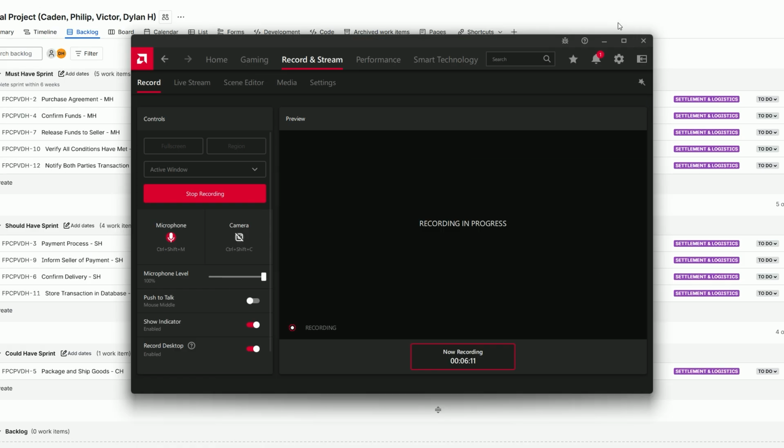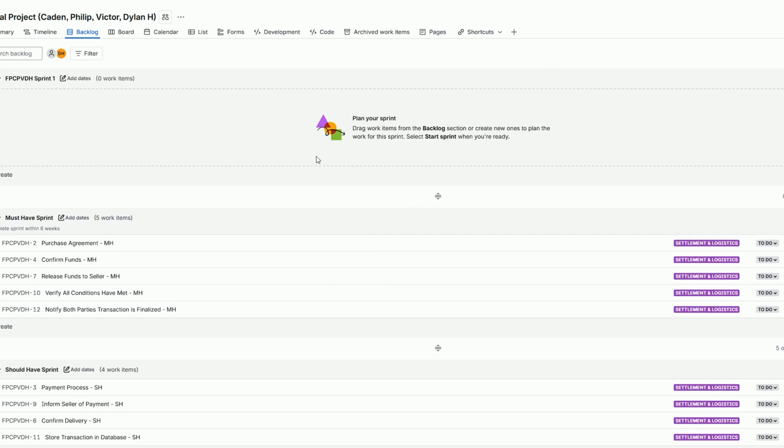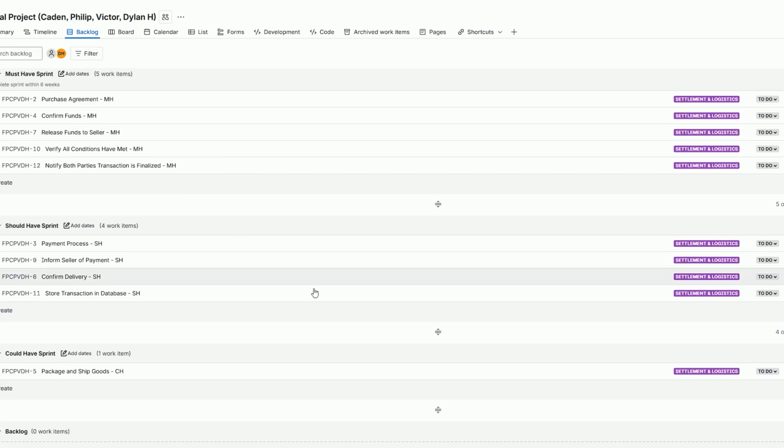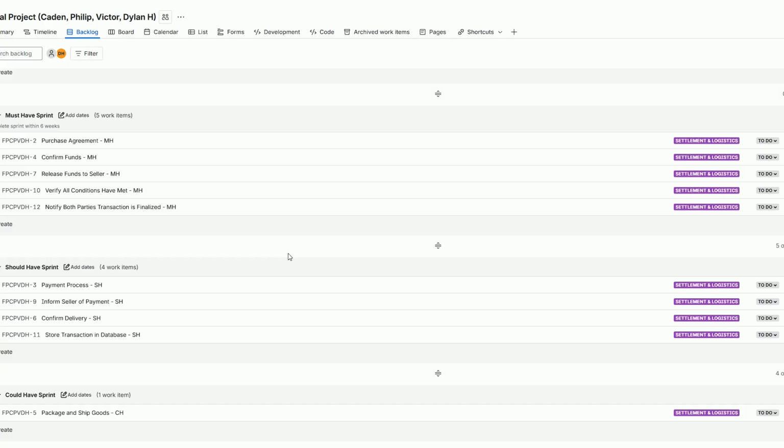Alright, moving on to the JIRA portion and our flight plan, understanding how we're going to break the work down. The way I decided to break the work down was we need to make sure we have our main priorities. These are the must-haves we have to have no matter what. So I've decided to break down our flight plans into must-have, should-have, and could-have. That way, if we're behind on schedule, we don't really have to work on the could-have, but if we have time, we'll add it in.